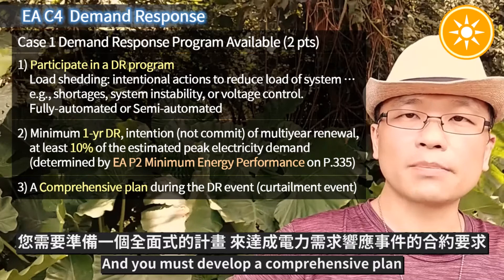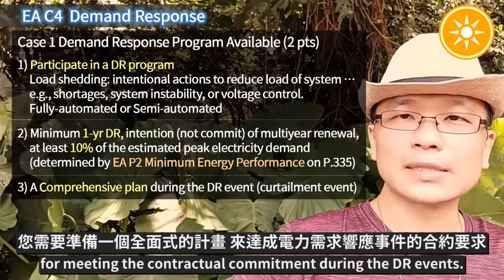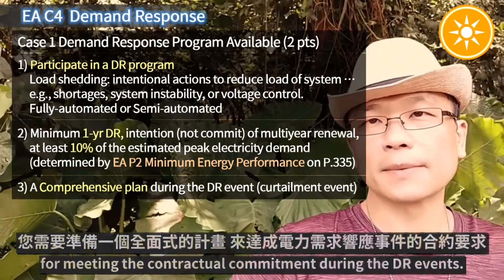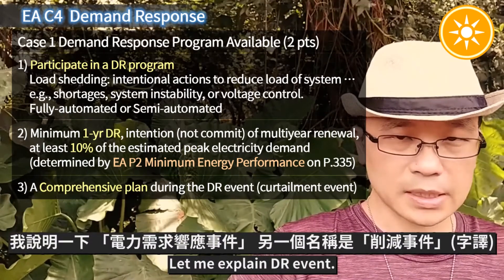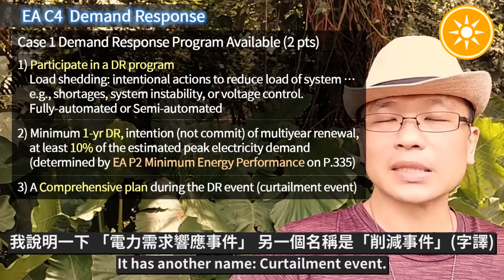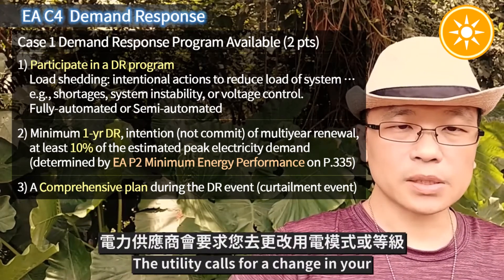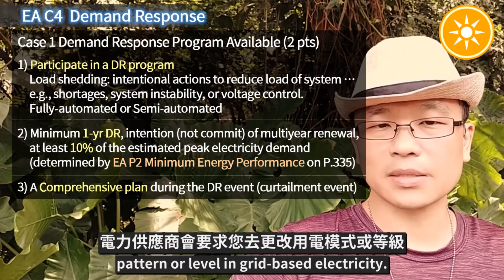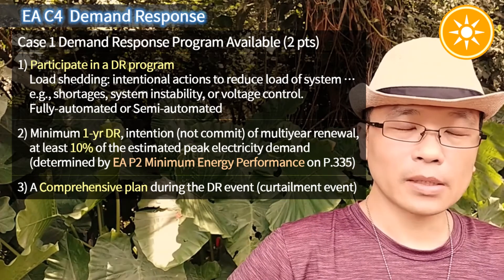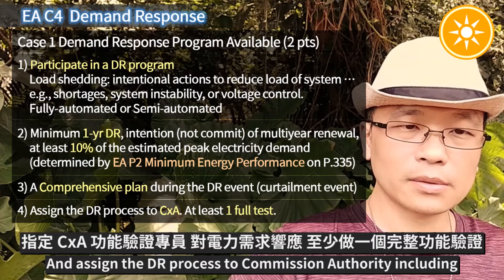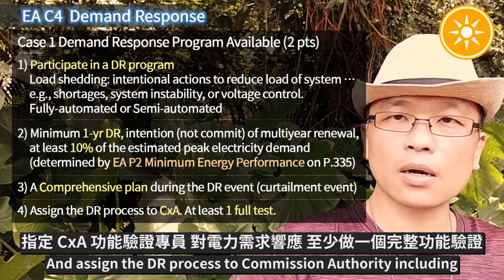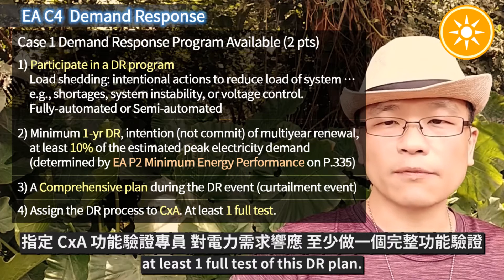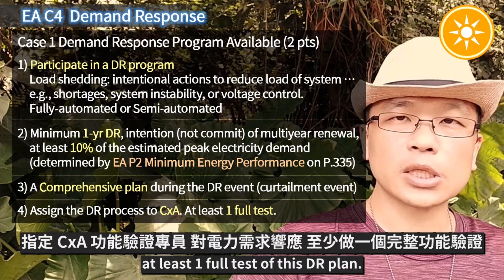You must develop a comprehensive plan for meeting the contractual commitment during a DR event. A DR event — also called Prerequisite to Minimal Energy Performance — is when the utility calls for a change in your pattern or level of grid-based electricity. You must also assign the DR process to the commissioning authority, including at least one full test of the DR plan.